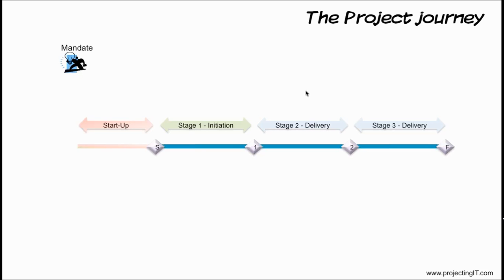They delegate the day-to-day management to the project manager, who is responsible for managing the project, which means the project manager will make plans, will provide reports to the project board, will delegate work to the team manager, will monitor the progress of each stage, and will take corrective actions to keep the stage in control and within targets.